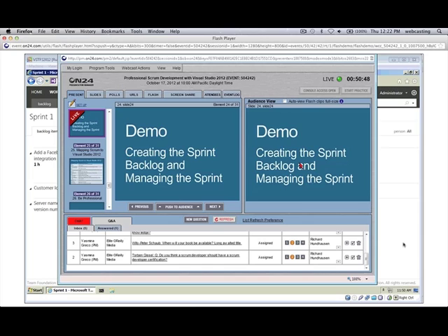Tommy, I do not. I know that sometimes that works in people's favor, but oftentimes it does not. So knowing just what's coming in this sprint and then letting the product owner decide at the latest responsible moment, which would be the next sprint planning meeting, what items should go into that sprint is probably best. If you're talking about just dragging PBIs to the sprints according to the forecasting tool, that's not such a big deal. Drag them back if you were wrong.